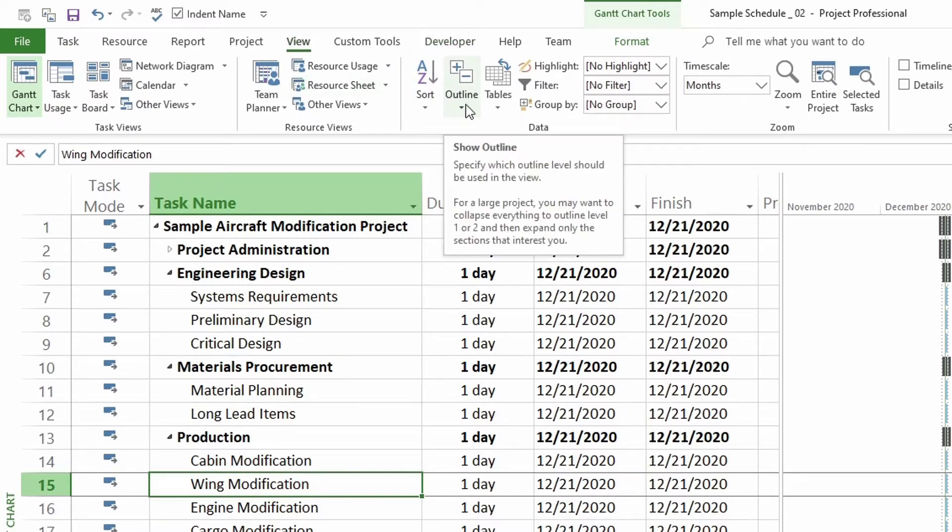And when I hover over it, it says show outline. Specify which outline level should be used in the view. For a large project, you may want to collapse everything to outline level one or two and then expand only the sections that interest you.